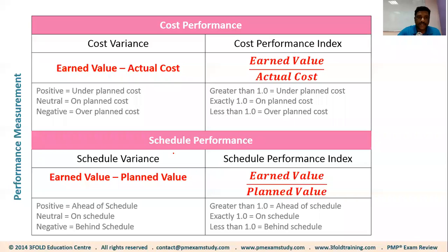But how much work did we complete so far? We completed 2.5 sides of the compound wall, right? And that's how we figure out the earned value is 25,000, isn't it? Which means the value of work we completed is 25,000, but the money we spent is 32,000. Which means straight away we spent 7,000 more than what we have accomplished. Getting my point? We spent 7,000 more than what we accomplished.